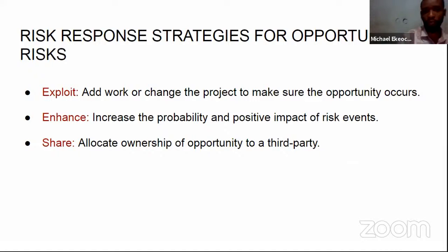All right, so for positive risks, which are opportunities, there are strategies as well, kind of like opposites of the negative risk response strategies. So you have exploit, which is to add work or change the project to make sure that that opportunity occurs, or to make sure that you maximize that opportunity. The next one there is enhance, which is to increase the probability and positive impacts of risk events or opportunities.